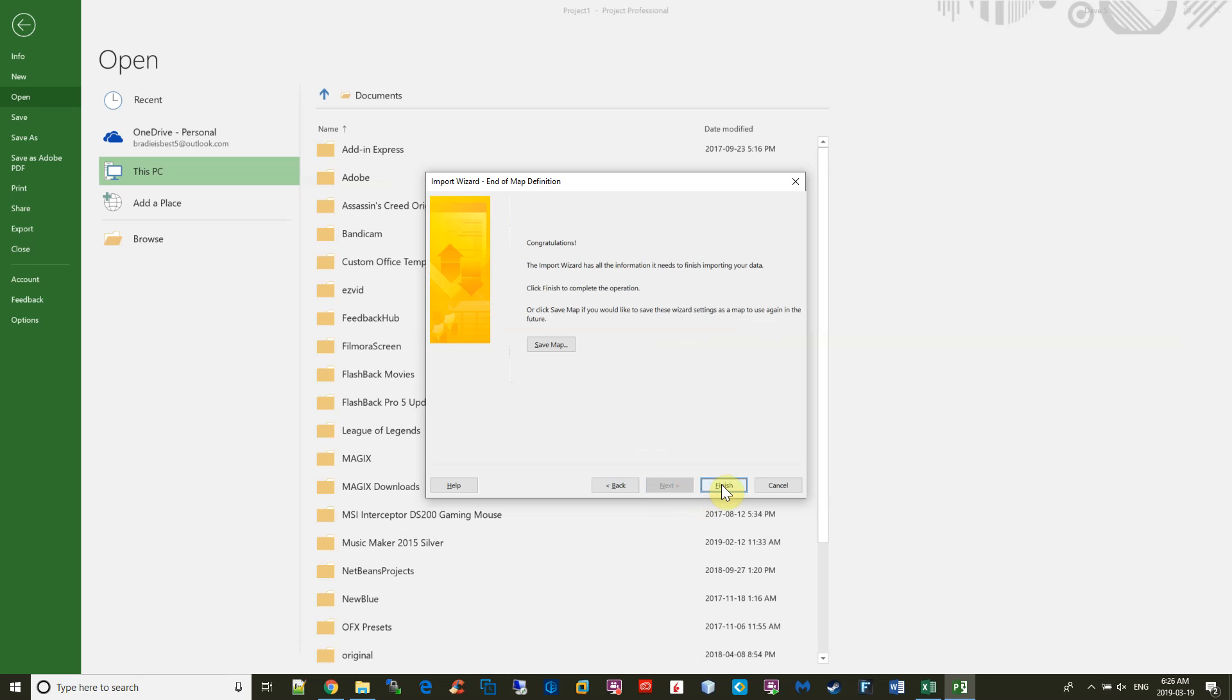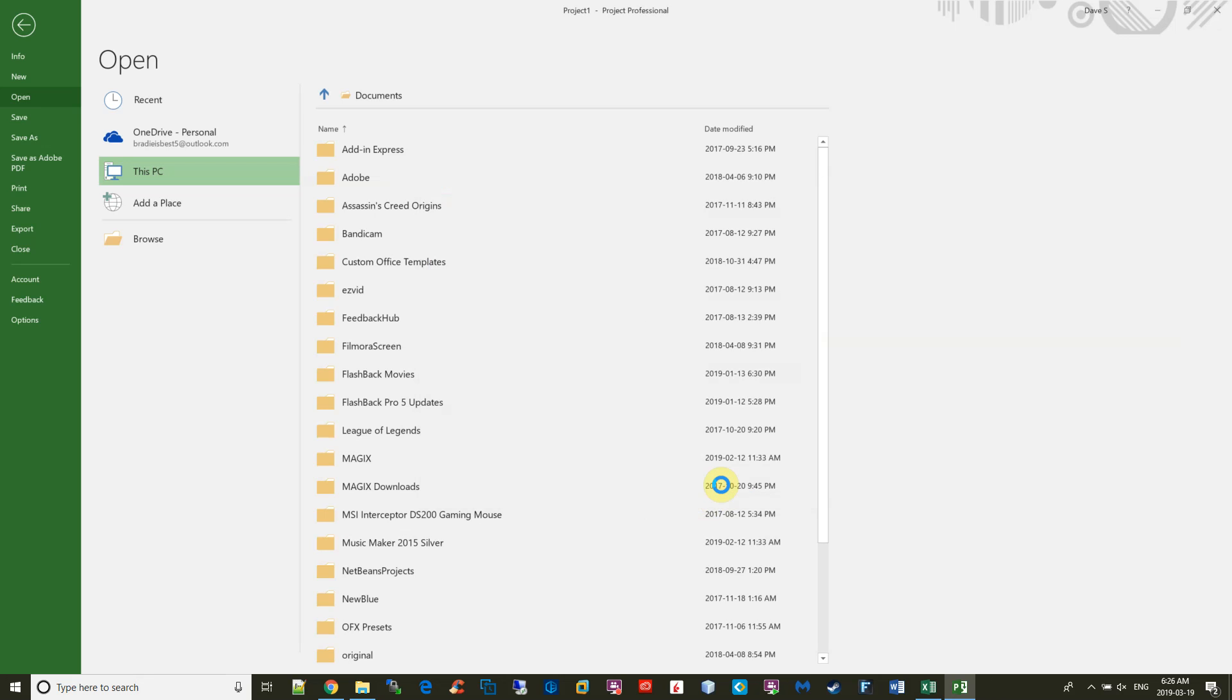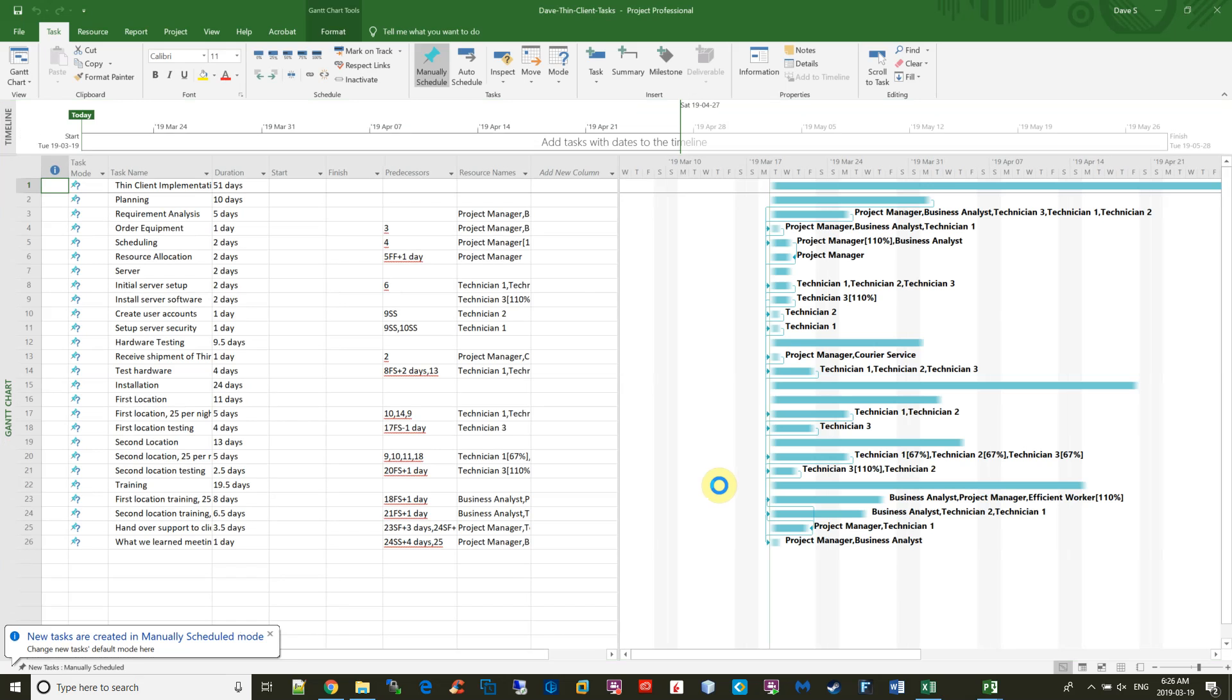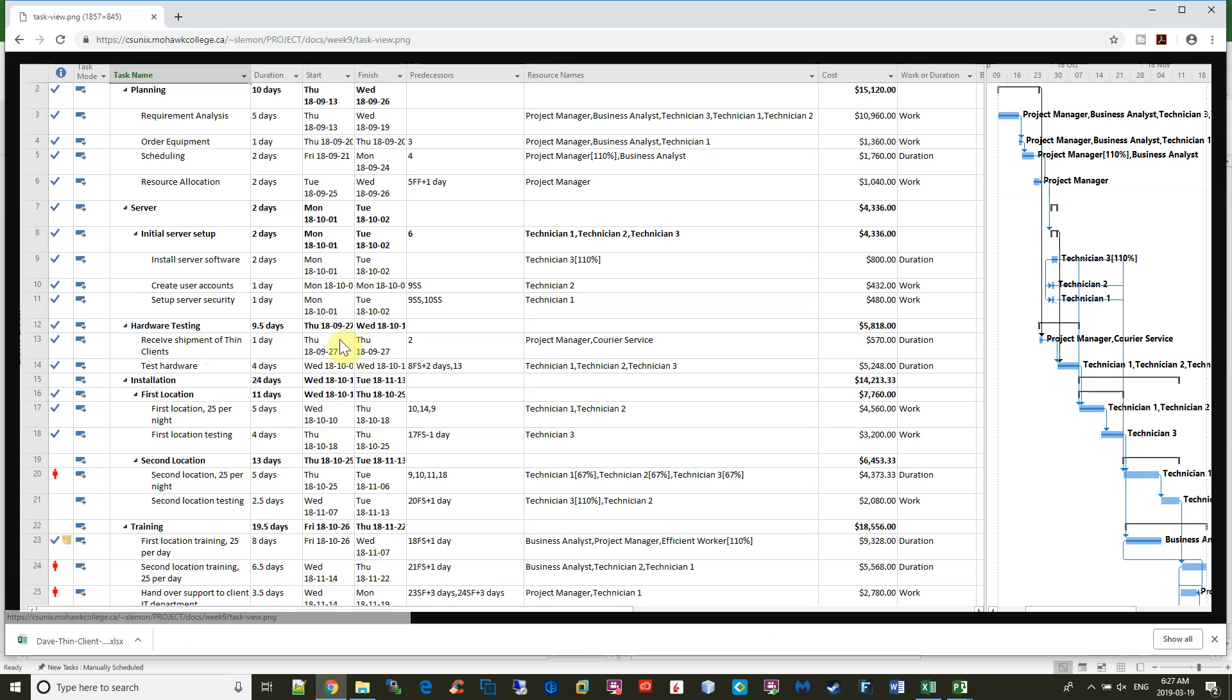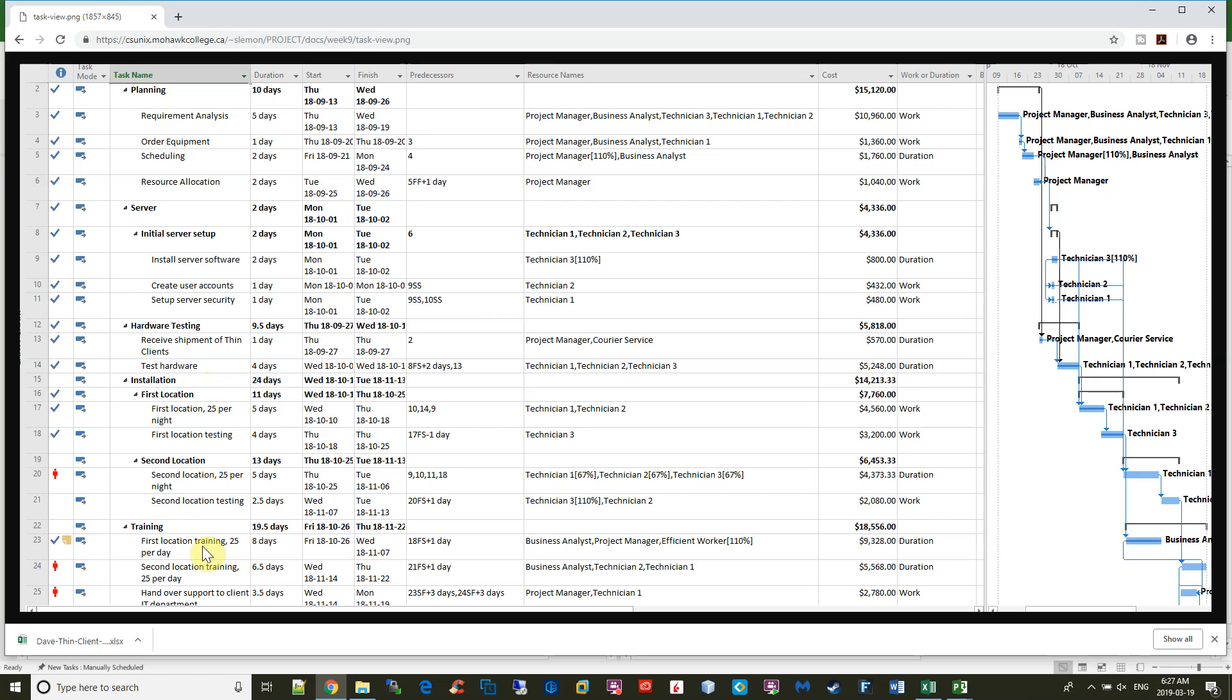And this is what I get. Now, in the green box here, there's a link called Tasks. If you click on it, you can see how the project is supposed to be laid out. We have planning, server, hardware testing, installation, and training as our main headings or summary tasks. The rest are all sub-tasks of these summary tasks.